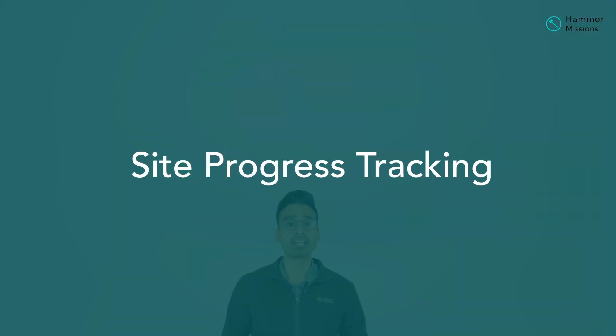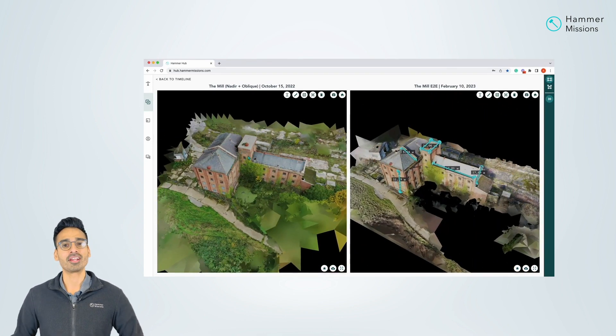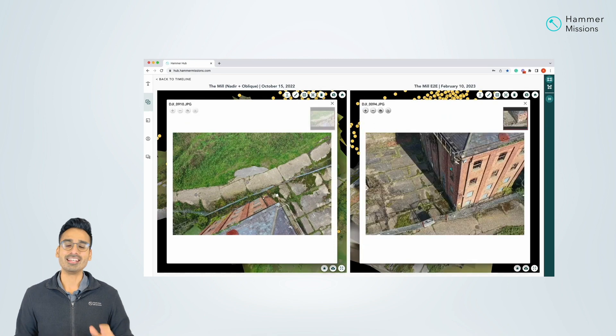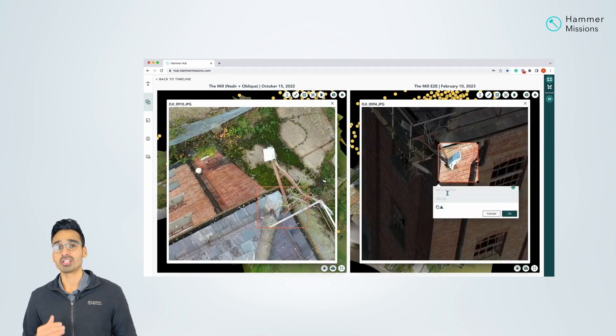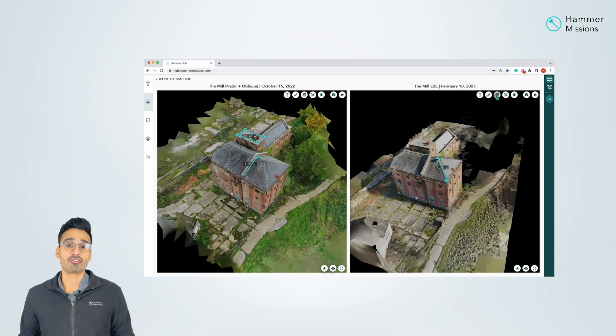The third application is progress tracking. Site progress tracking is really important because a lot of the time you have lots of things going on in these construction and mining sites, and they want to understand: is the schedule going to plan? Has everything been done according to plan and have they paid their suppliers? All of these questions can be answered using drone data if you create a map or model of their site every week and track how things are changing. They're able to plan better because they have a digital model of the site that you've provided them.